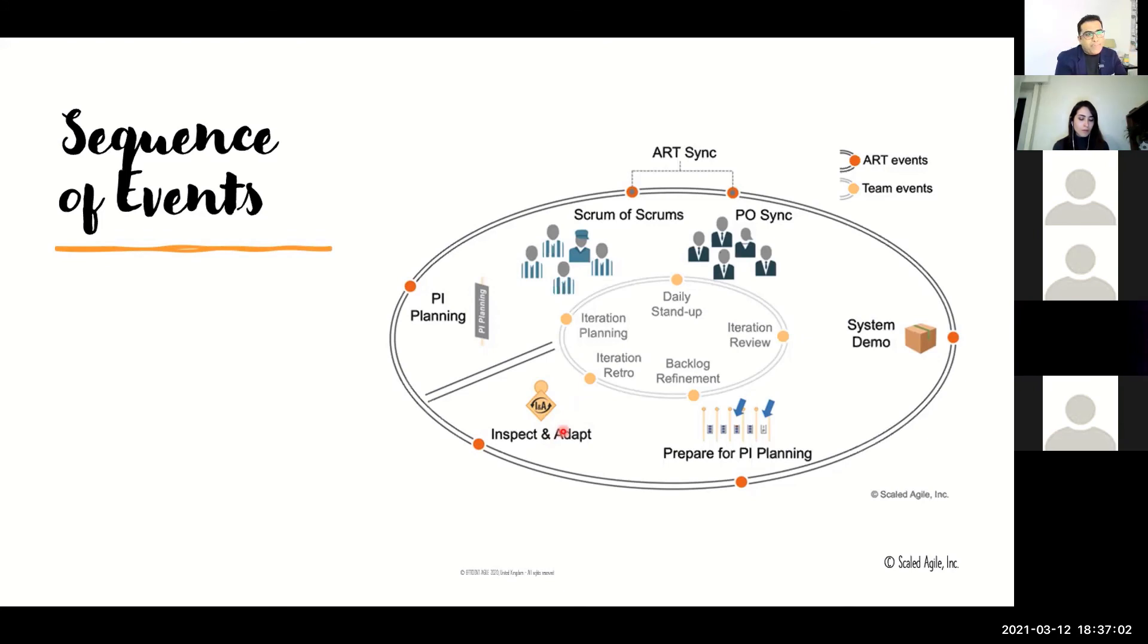What you see within the inner circle is what a team does: iteration planning like sprint planning, daily stand-up or daily scrum, iteration review which is your sprint review, iteration retro or retrospective, and backlog refinement. These are team level activities. You could also run backlog refinement sessions at the train level to refine your features on a weekly or bi-weekly basis depending on how mature your backlog is.